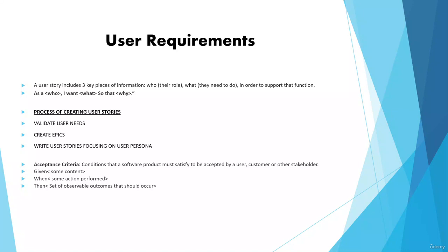A user story in Agile is a requirement or a feature or functionality described in the form of a story. The user story explains the who, what, and why of a particular requirement. For example, as an authorized user, I want to access manage accounts to add the beneficiary. This user story defines who is an authorized user, what is the manage accounts functionality, and why, which is to add the beneficiary. During the life cycle, these user stories are identified, prioritized, and selected for a sprint for implementing. They are further specified into tasks, estimations, and other details related to tasks.